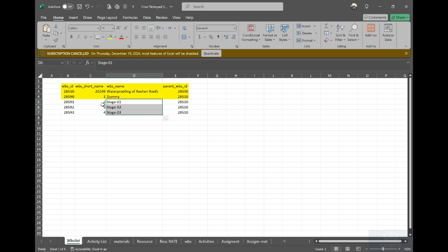We explained already in the course. And here your father name or the parent name, 28510, because it's all below the waterproofing, the main project. But if you need, for example, to put stage 1, stage 2, stage 3 below the dummy, it will be here 28590 from here. So it's very important to understand the arrangement of how you will do it.